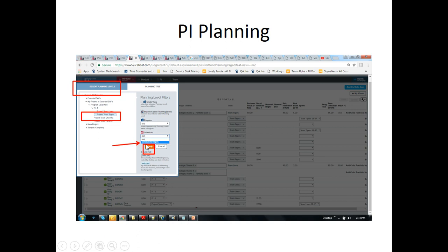This is where the schedules that we created play a role. Only if you have individual schedules created as part of the planning, as described earlier, will you be able to create the sprints which are in sync in terms of dates for two different teams. Otherwise, you will not be able to do this. So, just to repeat, if we need both the teams to start on the same start date and end date, you would require two separate schedules created as shown earlier.